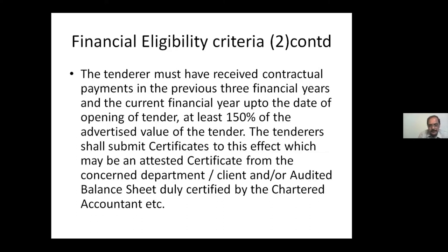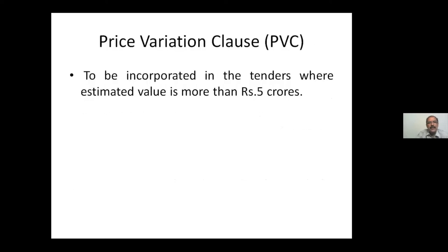And if the service contract tender is more than 50 lakhs, it has to be called in two stages. That is called the two packet system, technical and financial. That also I will discuss with you.